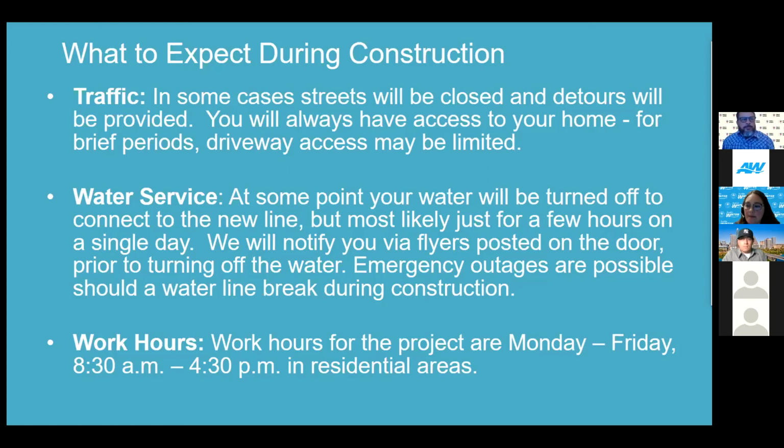Yeah, so these construction plans aren't addressing drainage issues per se. However, as part of the repaving, we will be milling your roadway and then reapplying asphalt. So we'll be removing what's there now and applying a fresh coat of asphalt.